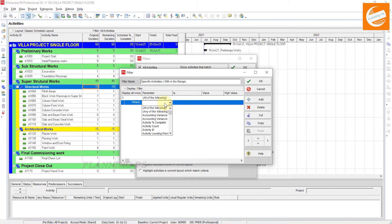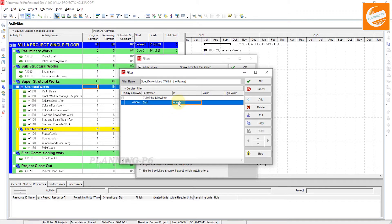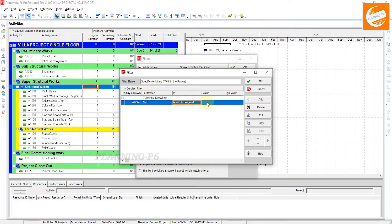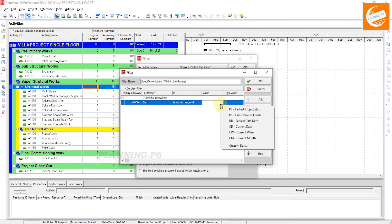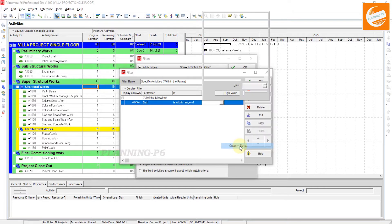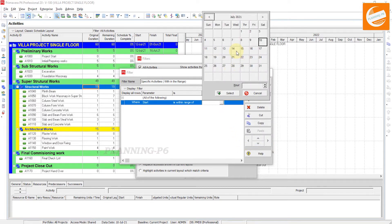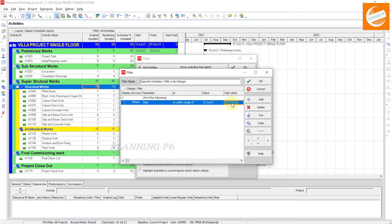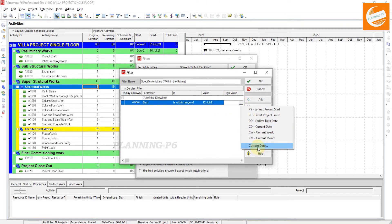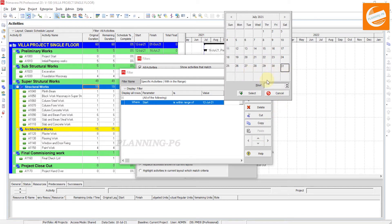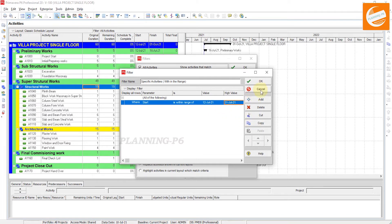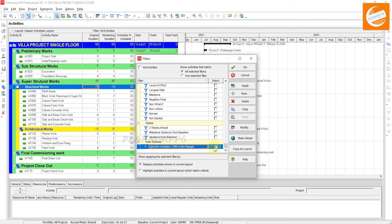Whatever you want to write for your filter name, you can write it here. Then go here and put the parameter as Start, and we are applying the filter within a range — select 'is within the range of.' Give the value: from which date you want to see the activities. I want to see from, suppose, 12th of July 2021. Select this date and give the high value date as a custom date — I want to see until 31st of July. Select it and then click OK. This is the specific user-defined filter.